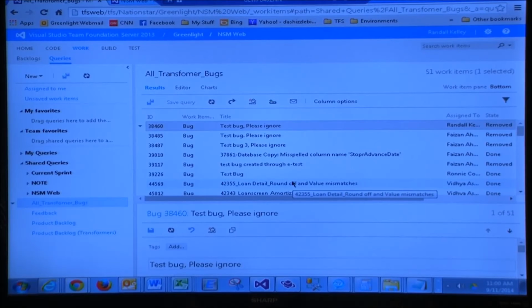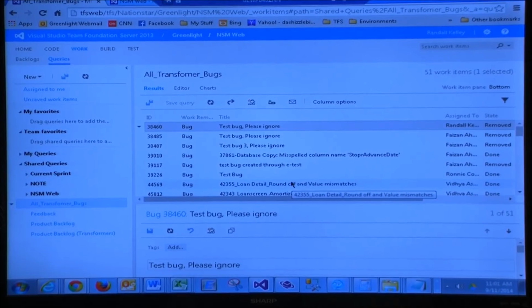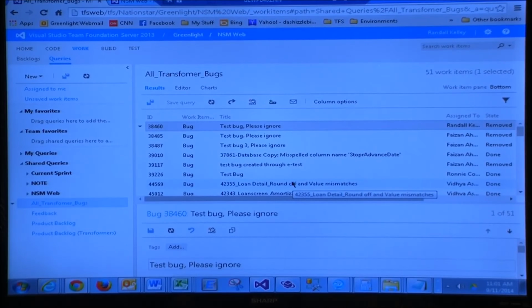So that's why I haven't pushed those reports out yet. We have templates created, but without that second level of view, I can only do what Cherry does now, which is count work items, or start with production backlog items and count tasks. The tasks obviously have the effort hours, but if you're not using it at the parent level, and I have a work item that's going to go through 3 sprints, it's harder to get that view to them yet.